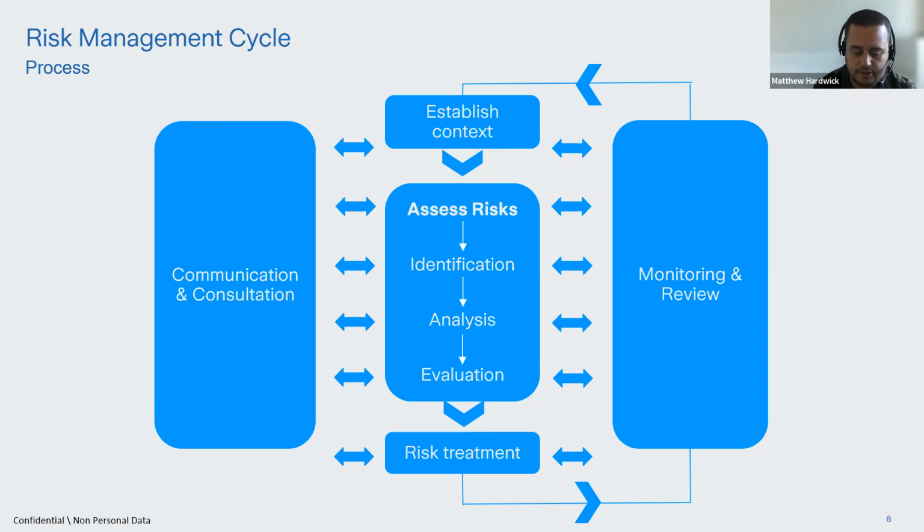And the common practice is to use the 4 T's methodology. We'll look at this a little bit later on in terms of options available to us and what the theory suggests is available to us. And then once we've applied those actions and we document them, as you can see, what we're ultimately doing within each of these stages is building ourselves a risk register. And we're going through all of the fields and all of the areas that we'd expect to see within a good risk register. That then allows us into the monitoring and the review.